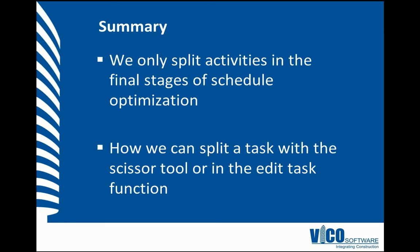In this vignette, we've learned that we only split activities in the final stages of schedule optimization, and we have shown you how to split a task with the scissor tool, or how to edit that task within the edit task dialog.